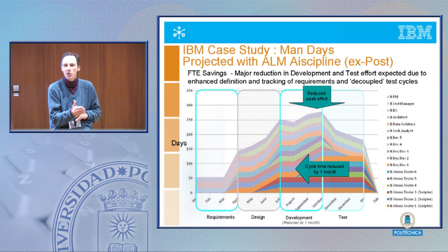Test-first development is about not waiting too late. Continuous build is about making sure that you've got a continuous, healthy system. Making sure you get whole team thinking so the test people and the deployment people are involved early in the project. All of these ideas are about helping that problem so you don't get such a spike late in development. The second thing they're about is pushing the time in. If we can reduce scrap and rework by continually refactoring, by rethinking the architecture early on so that we have a good solid architectural baseline, attacking risks early, all of these techniques that we know about, we can begin to push the time in to delivery. And therefore, again, we avoid a lot of the cost, which spins our test cycle to be too long and to miss our deadlines. So these are the kinds of things we can look at.